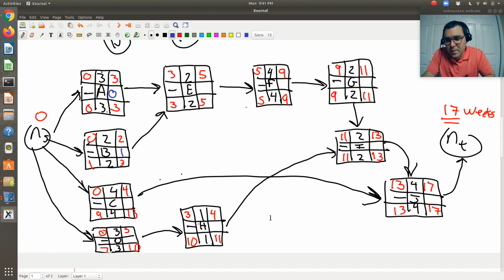When I look at C, it's even bigger, right? I have a 9 week difference between the earliest and latest possible starting time and finishing time. So I actually have a float of 9 weeks. For activity C, I have a 9 week window in which that activity can begin in order for the project to finish on time. And for activity D, I have 7 weeks, a window of 7 weeks over which that activity can begin for this project to be completed on time. Okay, cool. So A has to begin immediately. B, I have flexibility of a week. C, 9 weeks, and D, 7 weeks.